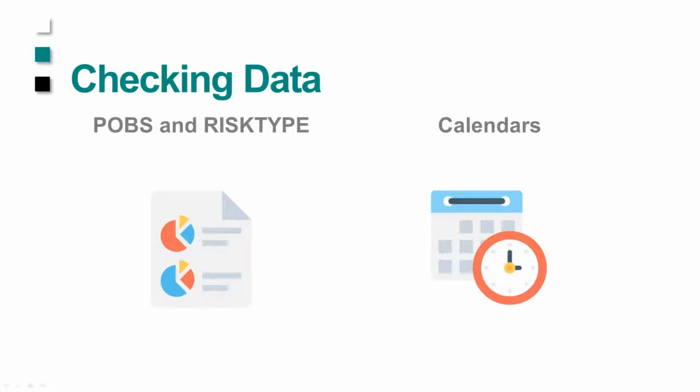For calendars, we can decide whether we want to roll those calendars down to the project calendars. In most cases, this is what you want to do. You want to maintain that calendar with that schedule, but you don't want to pollute your global calendars. So it will roll down the calendars and maintain them at the project level, as well as reassigning all of those into your activities at the project level.